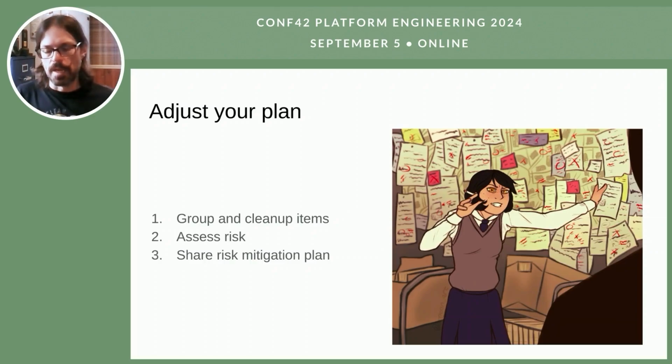So you could have different ways of saying the same thing. You group them together. Like the previous example, where you keep asking why, you may end up with a bunch of problems or potential risks that are different, but could result in the same behavior in the end. So you may still want to group them together, make it easier to tackle and think about them.